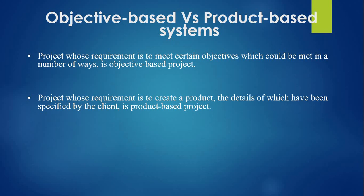Projects may be distinguished by whether their aim is to produce a product or meet certain objectives. A project might be to create a product whose details have been specified by the client — the client has the responsibility for justifying the product. On the other hand, the project requirement might be to meet certain objectives which could be met in a number of ways; an organization might have a problem and ask for a specific recommended solution. Many software projects have two stages: first, an objective-driven project resulting in a recommendation, which might identify the need for a new software system.